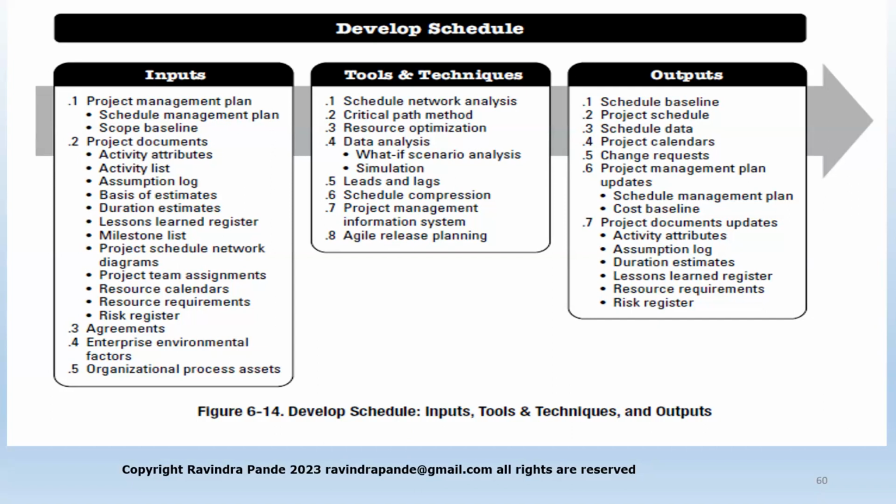Sometimes we might need to compress our schedule or try to deliver something within some dates. And for that, we might need some extra resources so that we can compress our schedule. This is called crashing. And we're going to learn it whenever we do hands-on experience on Microsoft Project. So schedule crashing is one of the techniques to make sure you deliver the project early and so on and so forth.